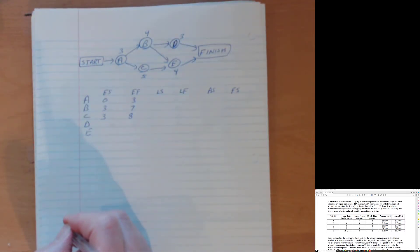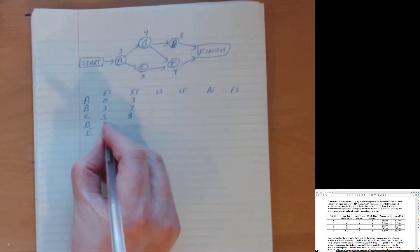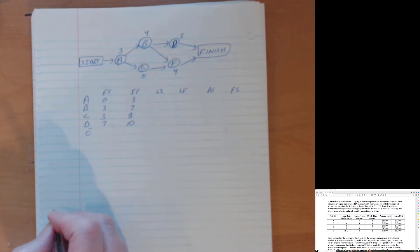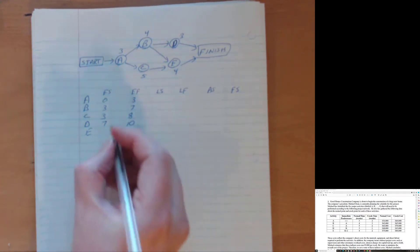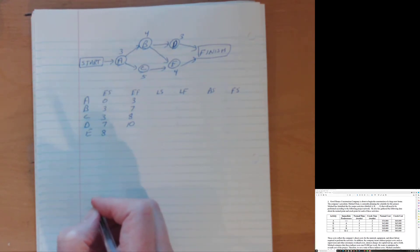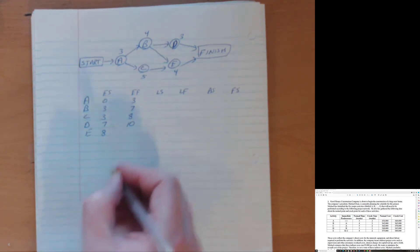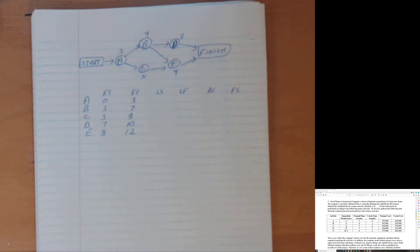Activity D as in delta depends only on B and can begin when B is completed. And B is completed on week seven. D takes three weeks and it is finished on week 10. E depends on two activities, both Bravo, B and Bravo, C is in Charlie. And so it can only begin when both of those are completed. B is finished in week seven. C is finished in week eight. The later of the two is week eight. So it's at week eight upon which both of those are completed. And then plus four for the duration of E gives us a completion time for the project and for activity E of 12 weeks. So this whole project will take 12 weeks.